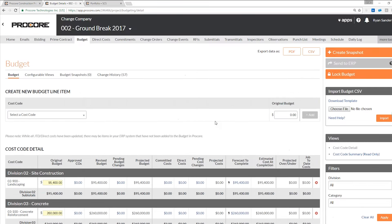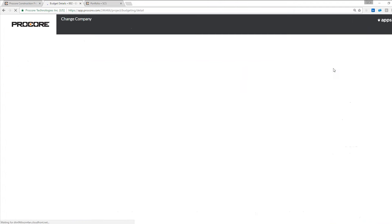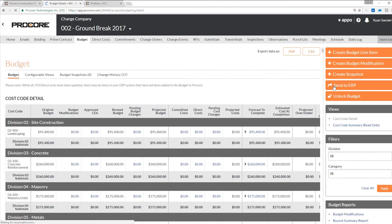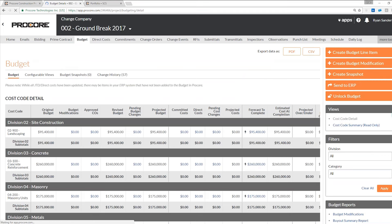When you log into your budget, the Send to ERP button will be gray until you actually lock your original budget in Procore. Taking a quick review — everything looks good — I'll go ahead and lock my budget and then send to our ERP tab. Once I've sent this to ERP, this item is available to be accepted or rejected by your project admin or account admin before it gets pushed over to QuickBooks.